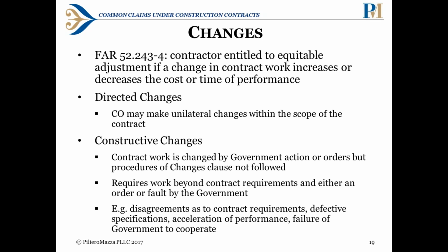Alternatively, there are constructive changes, where the contract work is changed by government action or orders without following the specific procedures of the changes clause. So the government hasn't invoked or necessarily intended to make a change where it's agreeing that you might incur costs and that it'll cover those costs, but there can be a constructive change either through implicit or explicit government acts.